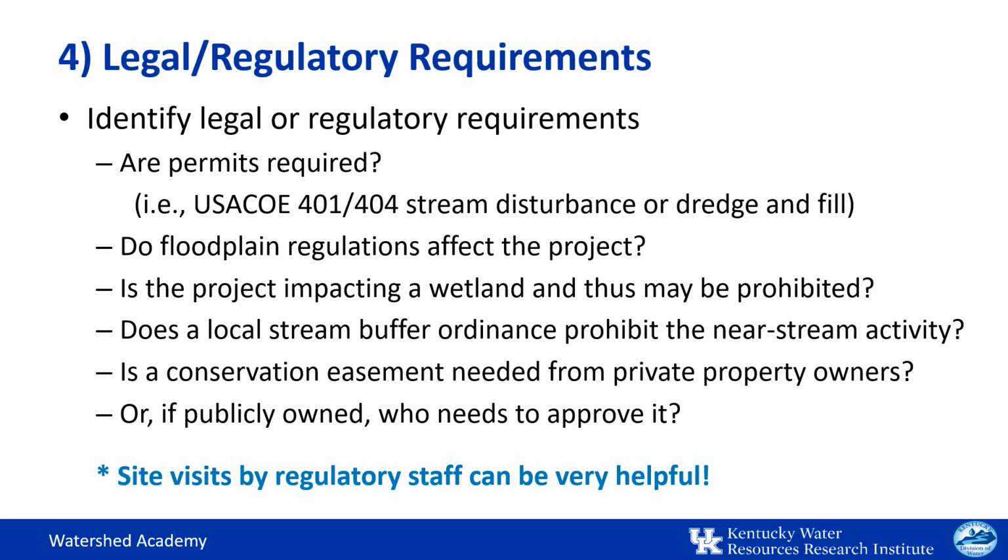You also need to identify any legal or regulatory requirements and whether or not these pose significant constraints for the BMP under consideration. For example, if the BMP involves work in the stream channel, you'll be required to obtain a Section 404 permit from the U.S. Army Corps of Engineers and a 401 permit from the state for dredge and fill activities.